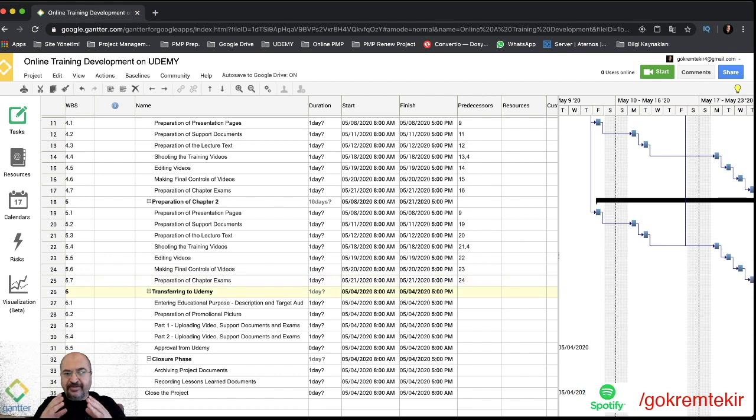Okay, I came to the phase of transferring to Udemy. There is no predecessor also. We are now on 27. We can start the 27th activity after both chapters have finished. I mean 17 and 25. After the 17th and 25th activity are finished, we can start the 27th task.